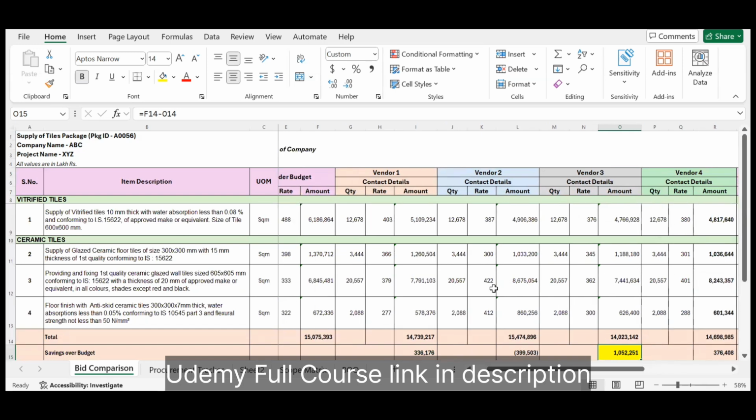If you find that a vendor is quoting abnormally high or abnormally low, you can suspect them, you can catch them, and maybe you can reject them at this point of time also, because you don't have any agreement at this point. Even if they have pre-qualified, even if they have done a lot of work in submitting the documents, you can still disqualify them and tell them, no, you cannot do this at this low rate. Either give the justification for this or we will disqualify you at this point of time. If they are quoting very high, you can always renegotiate with them.